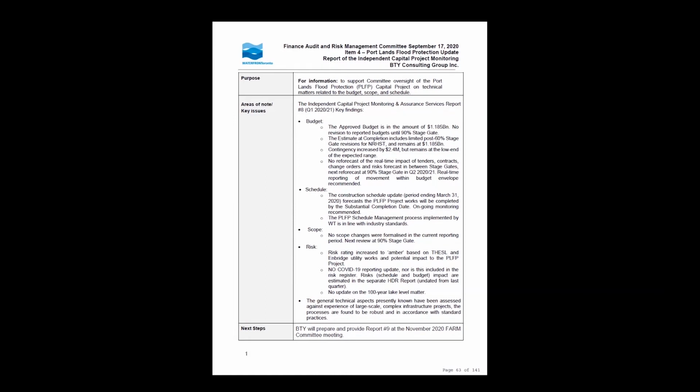Well, on this project, particularly, Ellis Don is working as a construction manager, so they're not actually responsible for delivery of the construction. But I think this is probably appropriate for David to speak to. Thank you, I will. Michael, particularly at the beginning of the project, as we were going through the procurement, there is obviously a substantial amount of due diligence done on all of the pre-qualified contractors, and we do go through a pre-qualification process. As we issue tenders and get submissions, Ellis Don is responsible for that on our behalf. They're looking at the contractors, looking at the bids, reassessing. And there have been a couple of contractors where some concerns have come up in terms of their ability to complete the project, because you're right, things can and do change, and obviously now have potentially changed substantially.